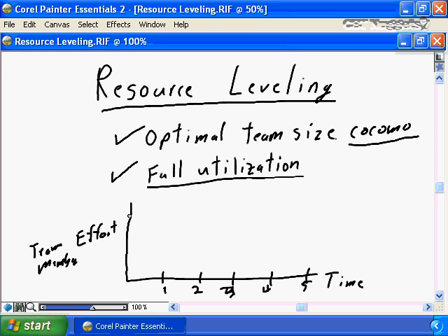And you're going to have a bar at some point in time, which is the optimal utilization for your team member week in, week out, day in, day out. If you're working on a day-by-day basis, this number is going to be 8, or the reduction of 8 based on the utilization that we talked about earlier. So it's down to 7.6 hours per day.